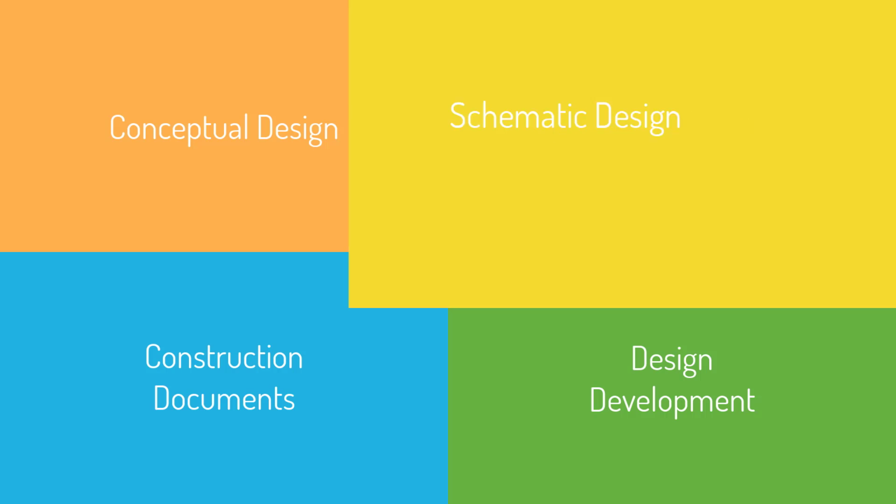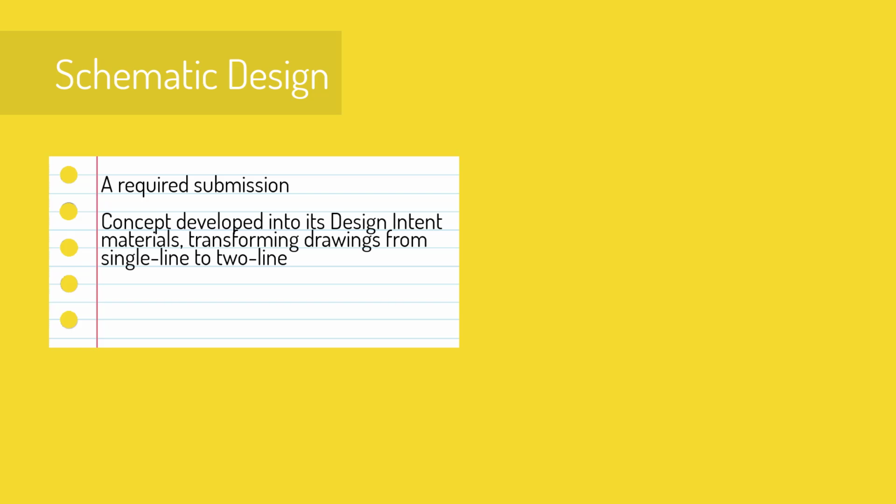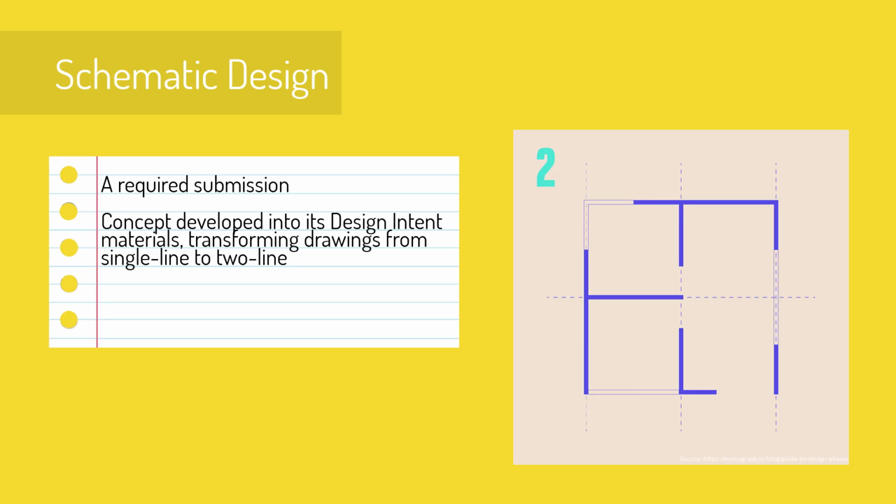Schematic design. Schematic design is a required submission, and it is the concept developed into its design intent materials, transforming drawings from single-line to two-line. Schematic design begins with the program requirements.